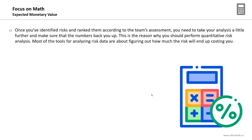In this lecture we will talk about the risk management activities — the numerical analysis of the risks you identified in your project using the concept of the Expected Monetary Value. Once you have identified the risks and ranked them using qualitative risk analysis, you need to take your analysis further. This process is the quantitative risk analysis, and it is optional — you execute it only for complex projects with risks that have a high probability or impact.